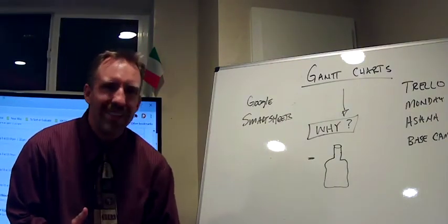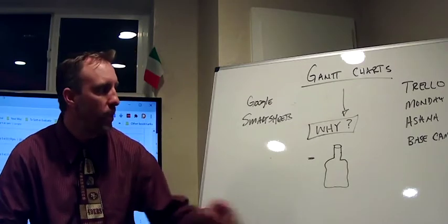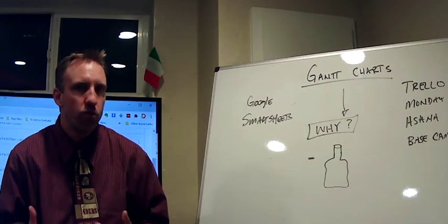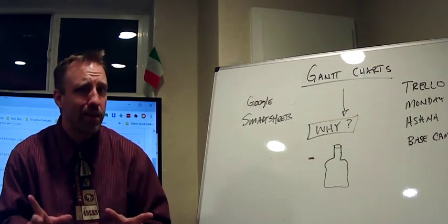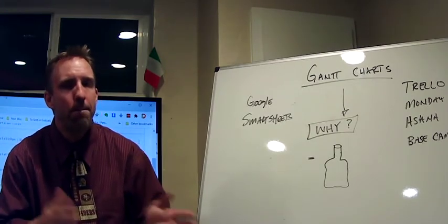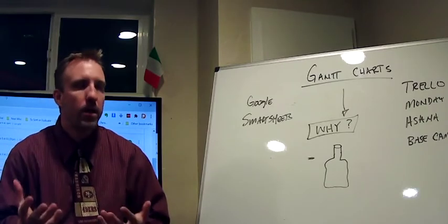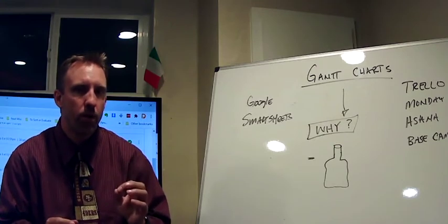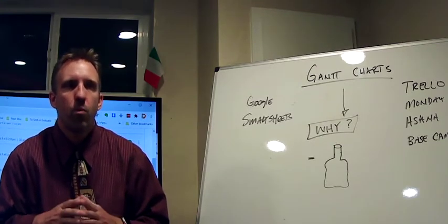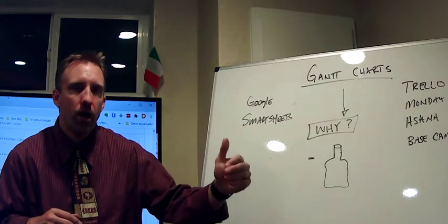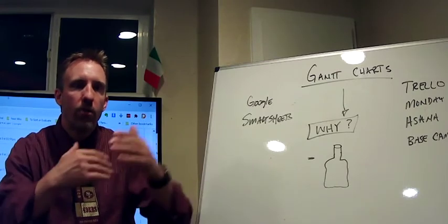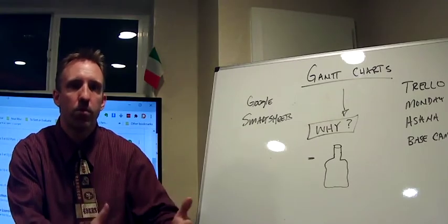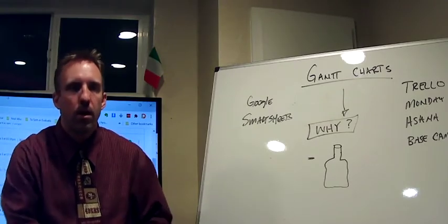The Gantt chart purpose is to see if you can identify these potential issues before they arise and, if possible, mitigate them. So what can cause a bottleneck? Well, dependencies. Okay, dependencies is the key word here. A dependency is when a future task requires a previous task to either be completed or have some level of completion before it can get started, right?